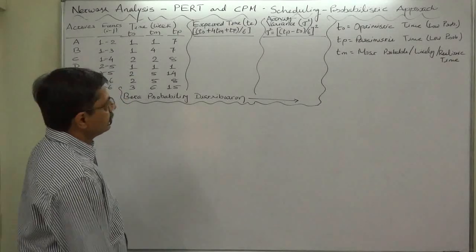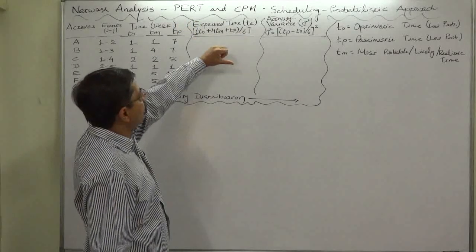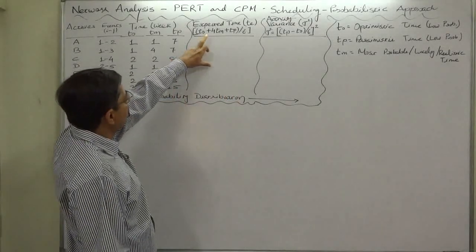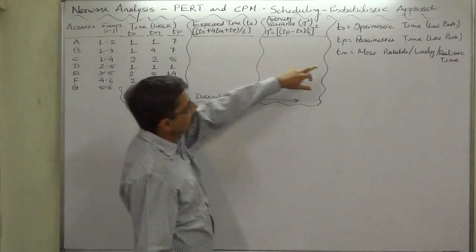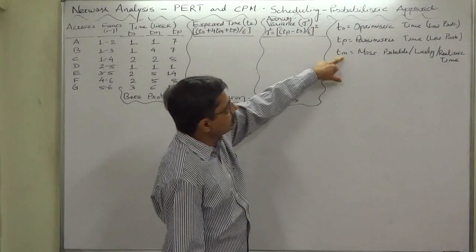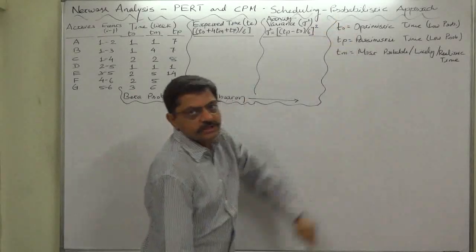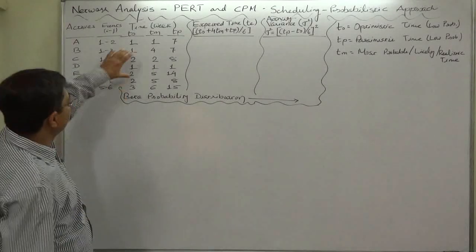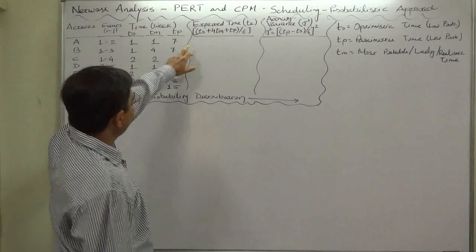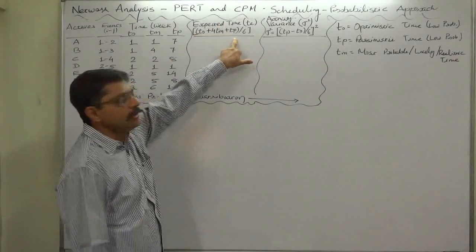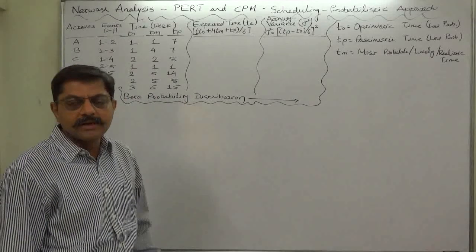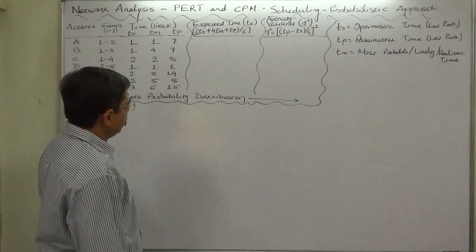The formula for expected time TE, based on this distribution, is: TE = (TO + 4TM + TP) / 6. On average, the probability of TM for an activity is 4 times that of TO and TP, which is why the weighted average of these three times is calculated. The weights are 1 for TO, 4 for TM, and 1 for TP, giving a total weight of 6. This is essentially a weighted average: sigma(x times w) divided by sigma(w).